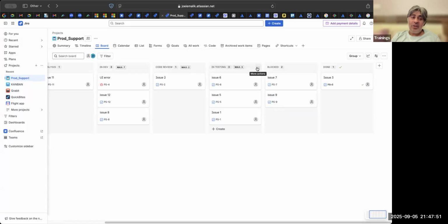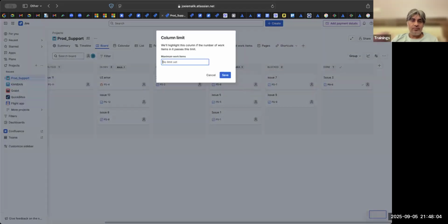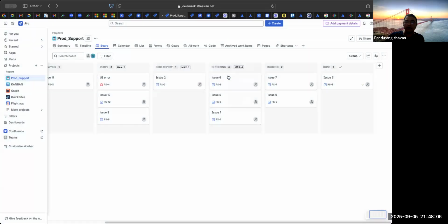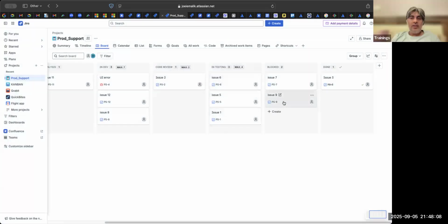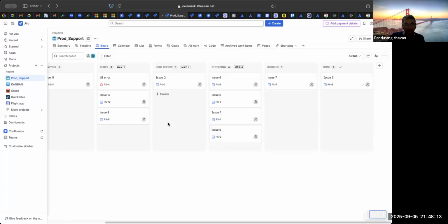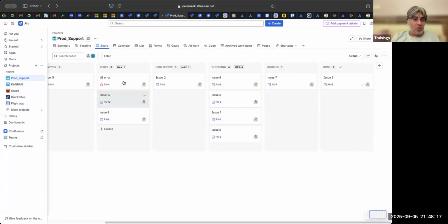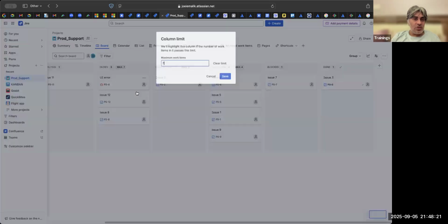But again, that is not your specialist QA. He is a new guy, so he will not be able to handle 3 tickets. He'll be just able to handle 1 more. So we can put the limit to 4. And then let us say we assign this guy, but again, the total limit is 3 only to that guy. So in this case, we will move this to 6.